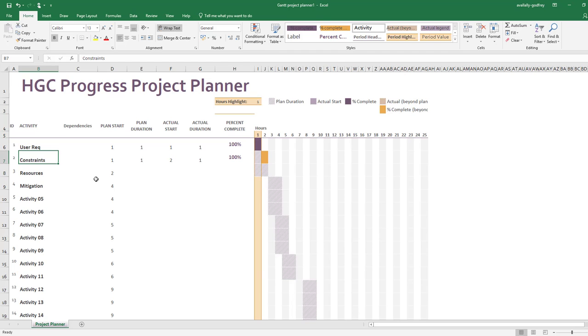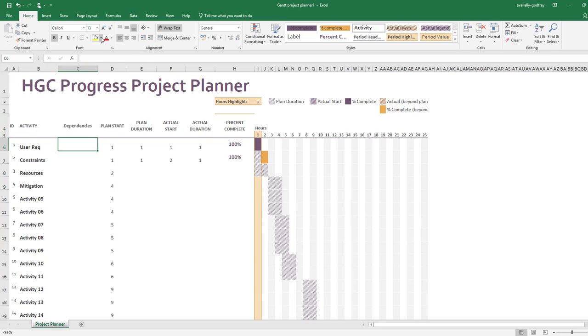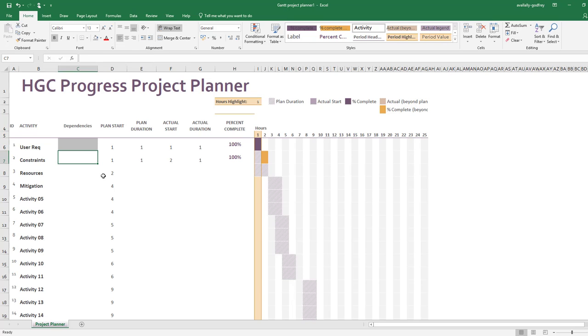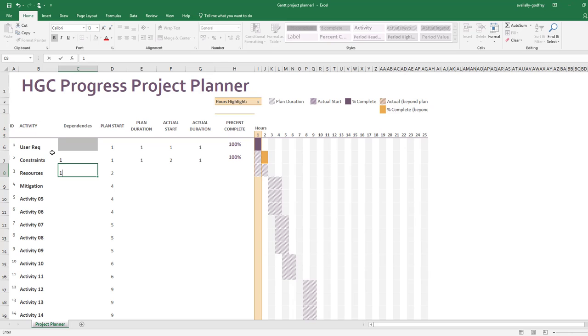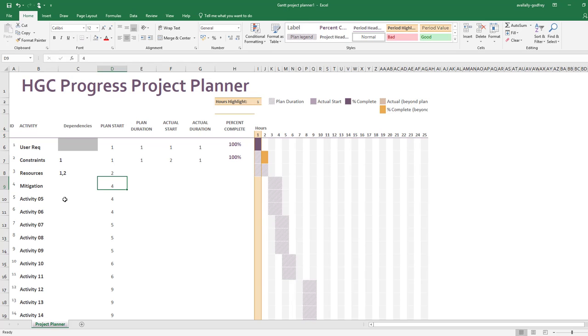So user requirements—that has no dependencies because I have to do that first. Constraints, well my constraints are dependent on my user requirements, so I'm going to put in there the ID number of the activity that it is dependent on. Resources, well that's going to be dependent on the user constraints and on the user requirements. I'll put both in there, and you should see that these begin to work their way up as you go along.